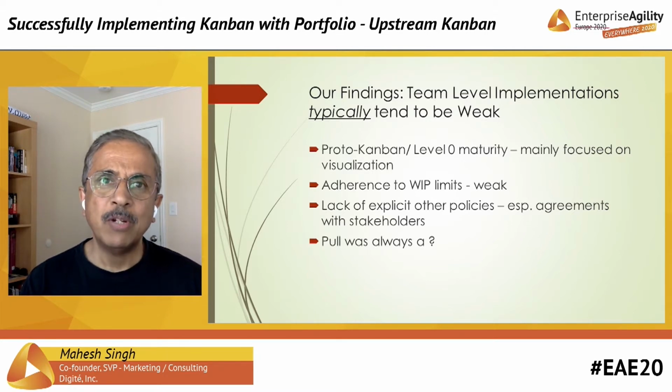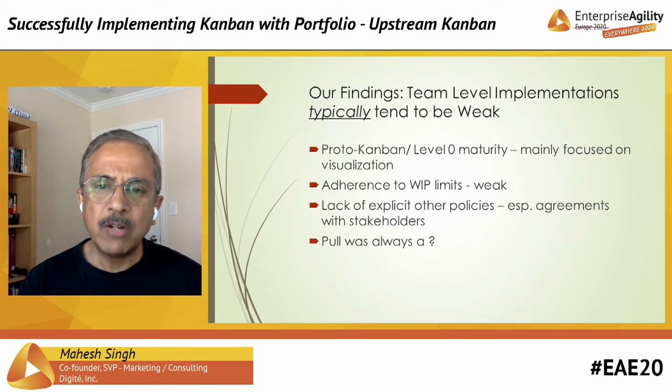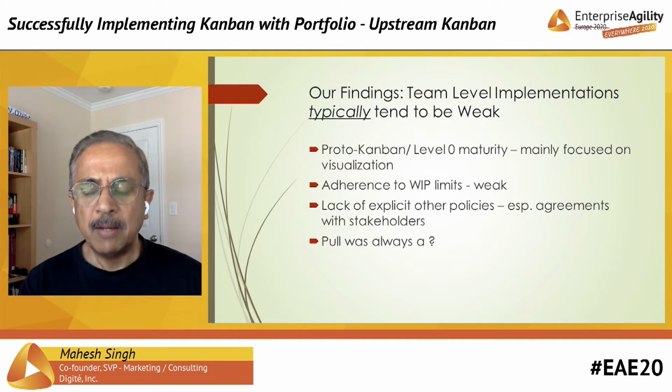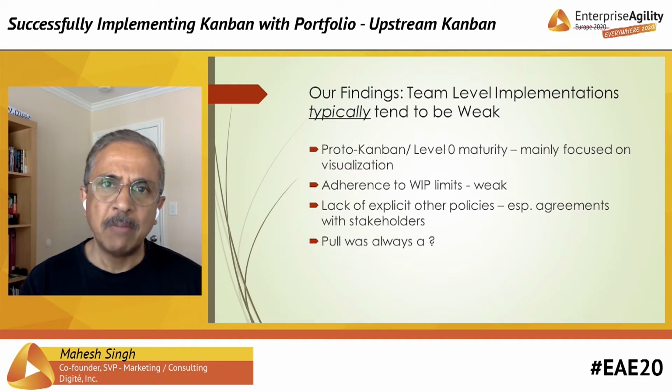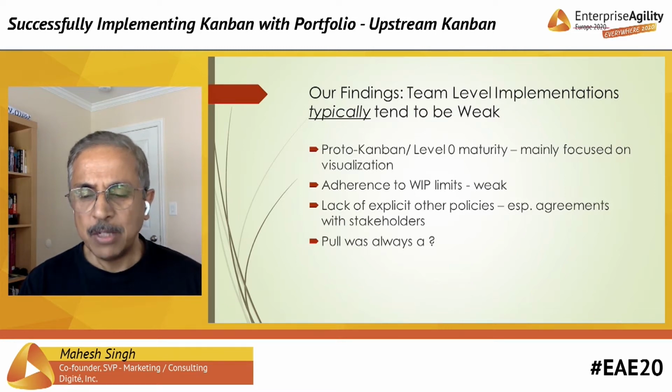And then one of the big principles around Kanban, which is to implement pull, although pull and flow are a big part of implementation of Kanban, in reality pull per se remains a question mark, which means that team members still tend to get assigned work rather than pulling work when they have capacity. And it is done maybe collaboratively. They may do it during a daily stand-up meeting or in a weekly replenishment meeting, etc. But pure pull, where a team member understands that they have capacity to do work, and therefore pulls a card, remains, in my experience, somewhat weak.